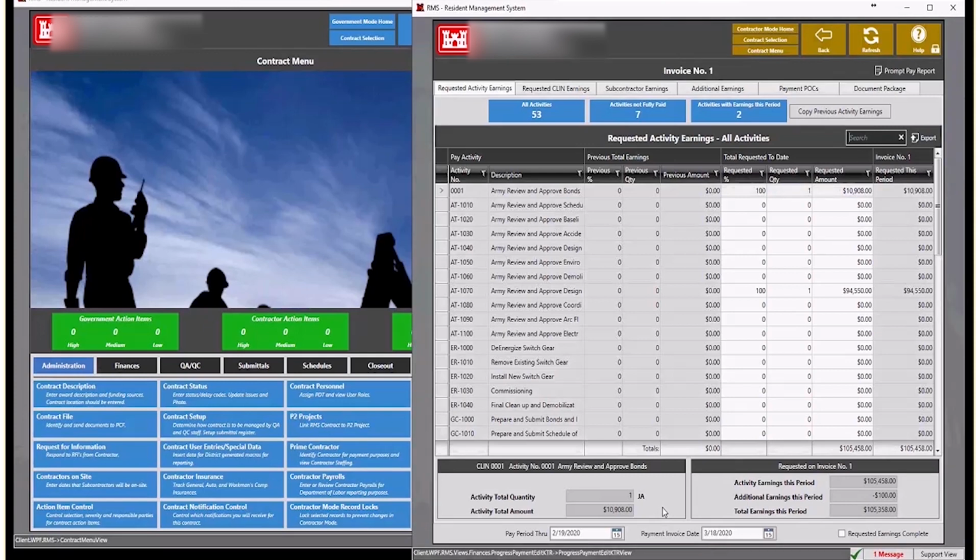Our contract line items, which are also called contract line items for obligations in CFMS, our CLINs will try to mimic the obligations, but can break down obligations into a deeper level. CFMS does not care about our contract line items either. All they care about are the obligations as you upload the payments into CFMS. So when you're talking about balancing all of these activities, it doesn't matter to Millington. They only care about the obligation level.